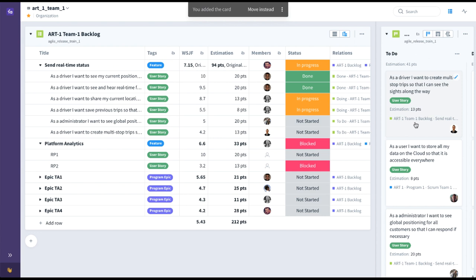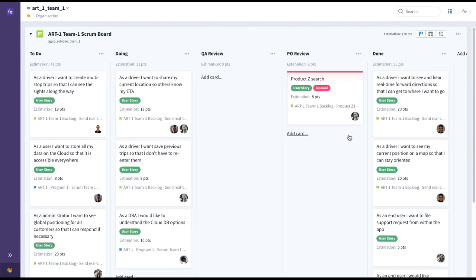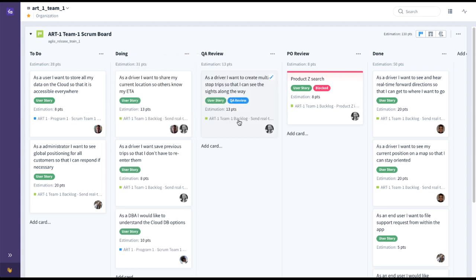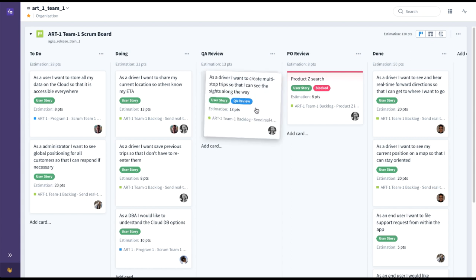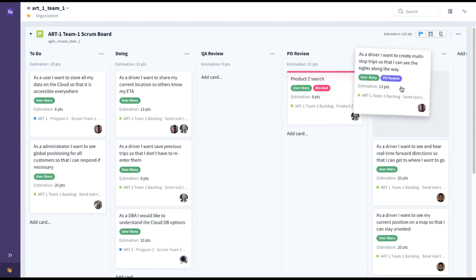Here you can see that this card representing this particular user story now exists in both places — it's here on the To Do column of the Scrum Board, and it's also still in the backlog where it can be tracked via Relations. As the team works on everything committed during an iteration, the card will be pulled from To Do to Doing. Once development is done, it'll be pulled into QA Review, where the embedded QA person is automatically assigned and tagged. Once QA Review is passed, it moves to Product Owner Review, where the PO is automatically assigned. When the PO approves, it'll move to Done.